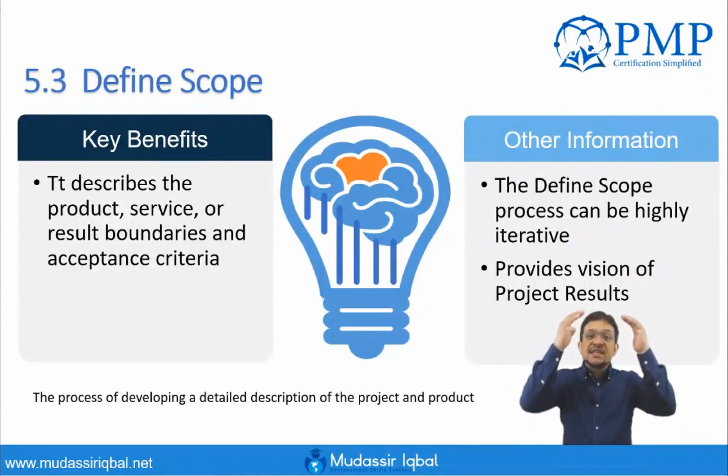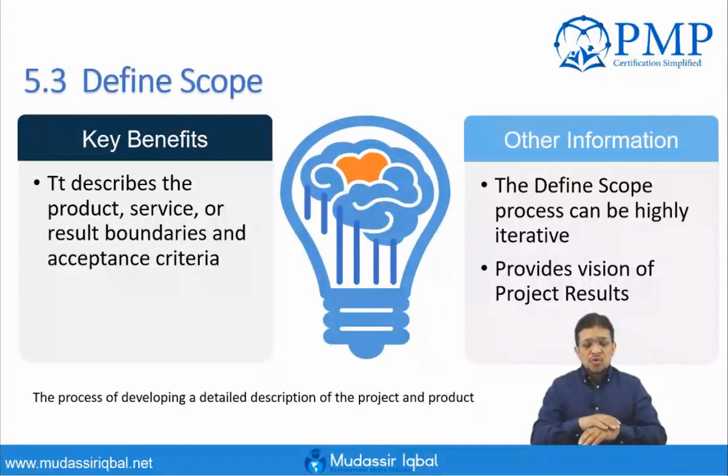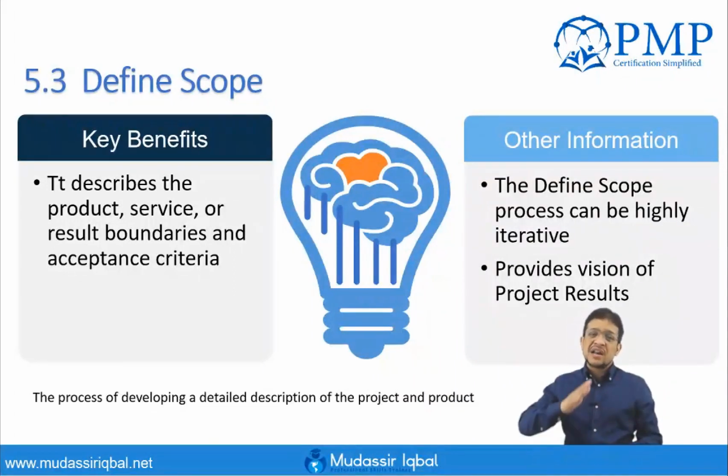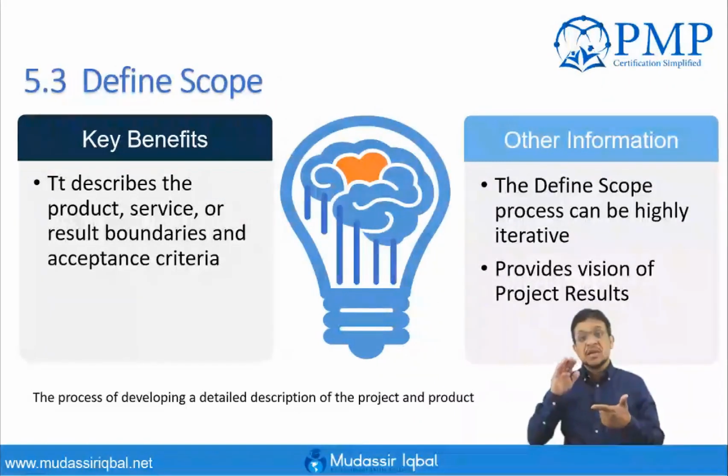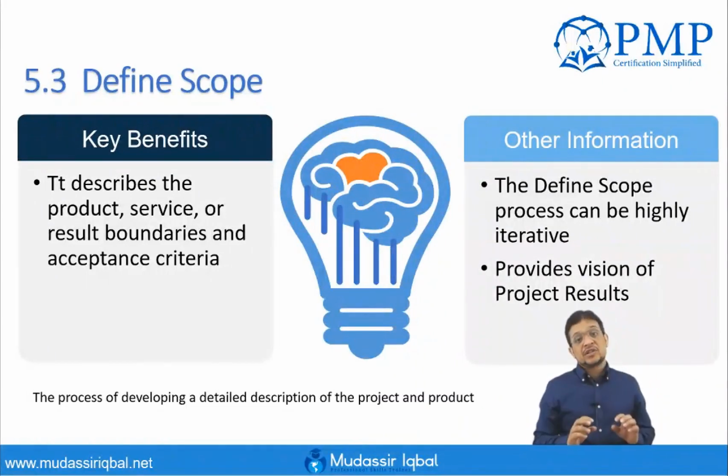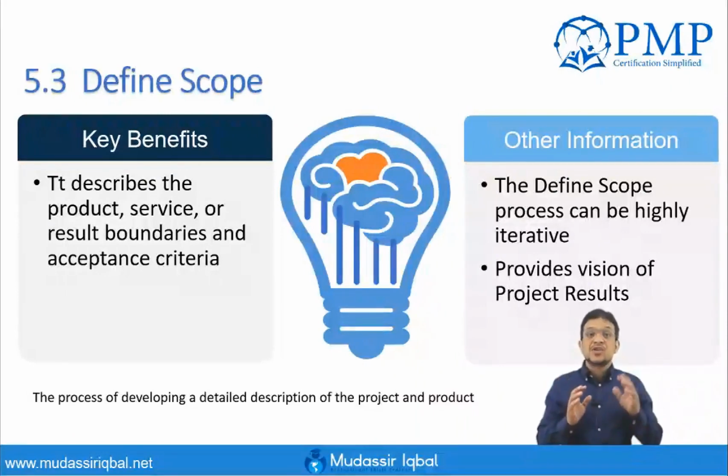You need to listen to everything. You need to look for every requirement which is related to this scope, related to the business objective that has been given to you. But what is important is that because of time, cost, money, other capabilities, market conditions, and time to market, not all of them will become part of the scope. So scope is a subset of the requirements.